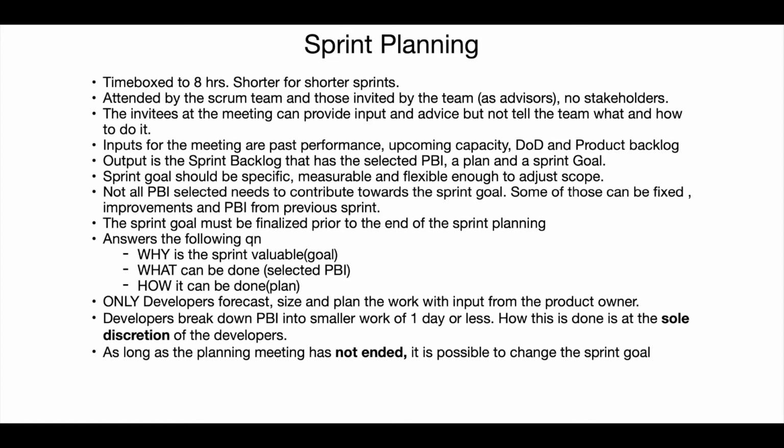Only developers forecast, size, and plan the work with inputs from the product owner. Developers break down the PBI into smaller work of one day or less. How this is done is at the sole discretion of the developers. As long as the planning meeting has not ended, it is possible to change the sprint goal.